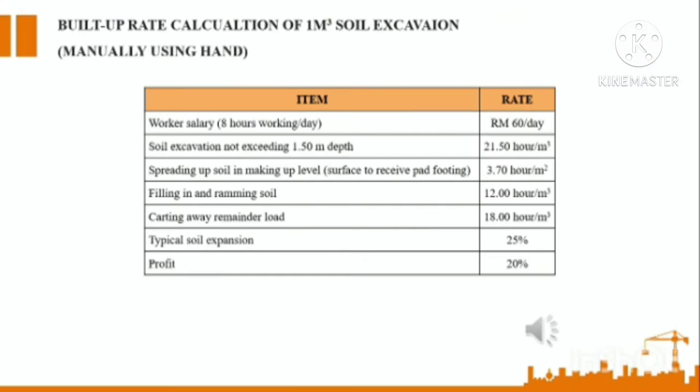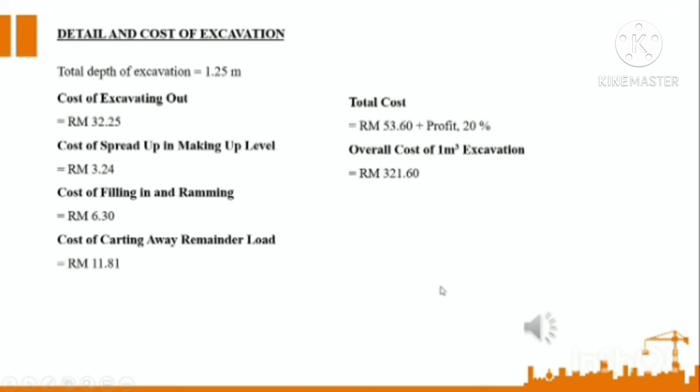Rate calculation of 1 meter cubic soil excavation manually using hand. The table below shows the schedule of rate of soil excavation in detail. We are not providing the rate of soil excavation exceeding 1.4 meter depth because our total depth is only 1.25. We move to the detail and the cost of excavation.